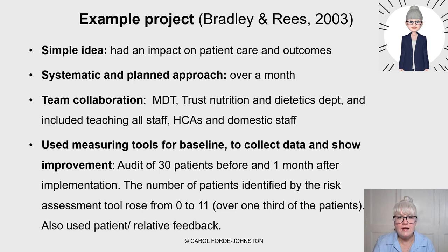And they used, as I mentioned earlier, you must have a measurement, robust data collection. They used measuring tools for a baseline. So if you're looking at an improvement, you need to know what's happening currently. Why do I need that improvement? And to collect data, and to demonstrate improvement.